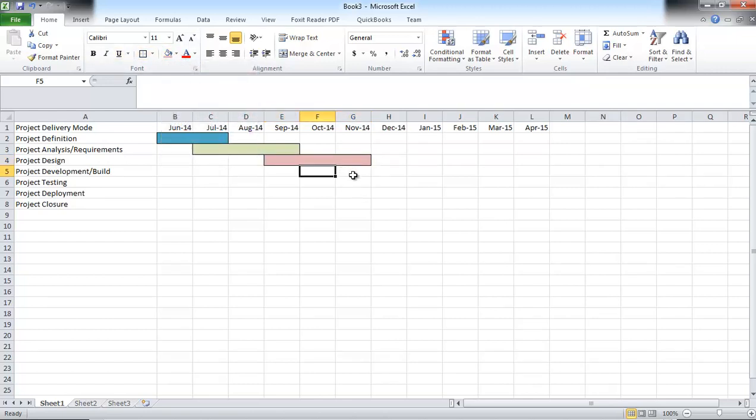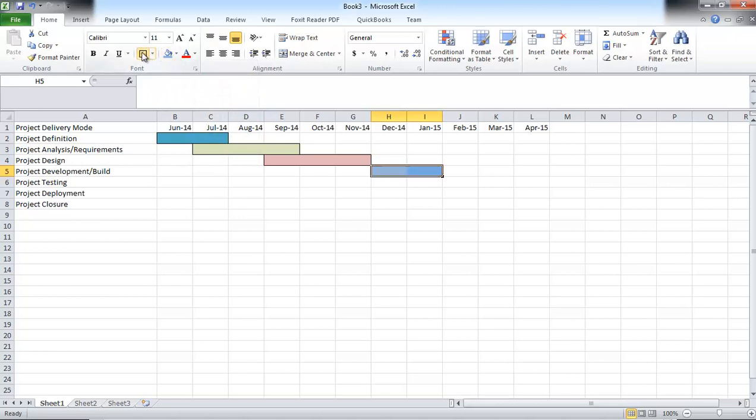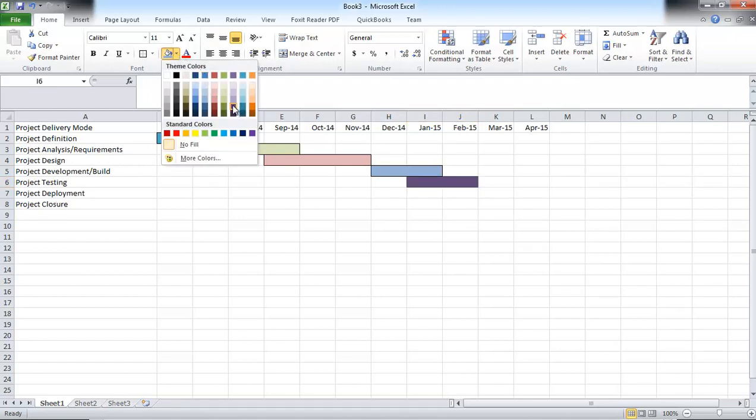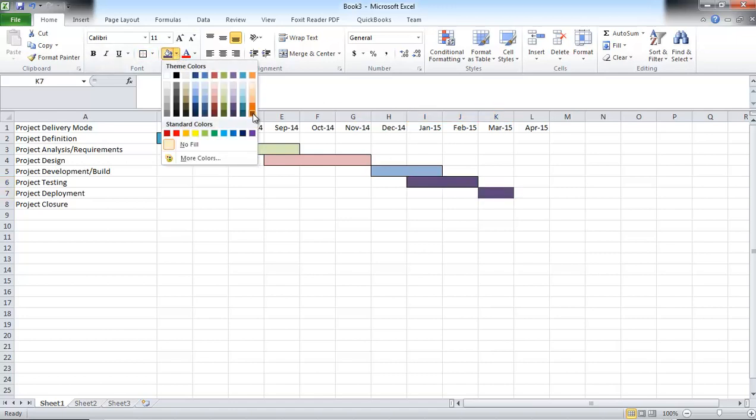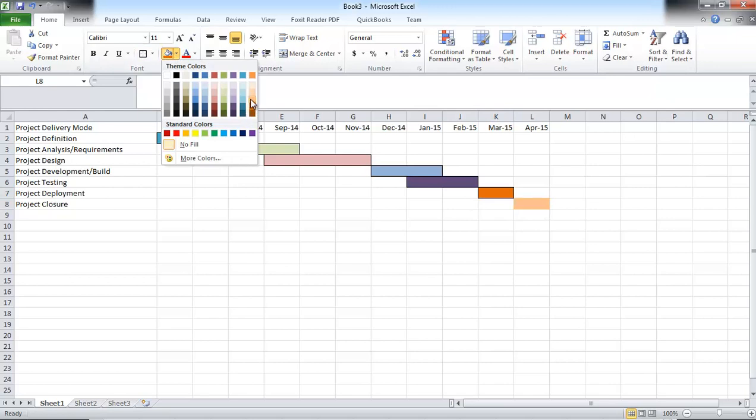And let's say the development build phase can only start when design is finished. So we pick two months and then we pick the blue color. And as you can see there's no overlap here. And same with testing. But testing typically can start a little bit earlier when only partial components are done, so you can engage testing team. And that's where we'll just pick a different color again, and we identify the activity. And then deployment in one month, and then project closure would be an activity in April.